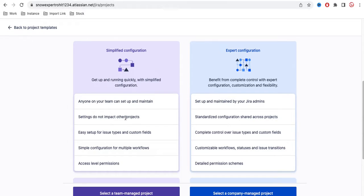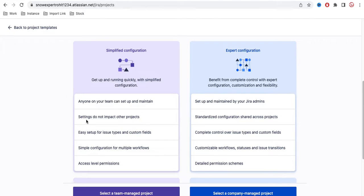Another difference: settings in a team managed project do not impact other projects. For example, if you change the workflow in a company managed project without much knowledge, it can impact other projects too. But in the team managed project, changes will be limited or scoped to that particular project and will not impact any other project.